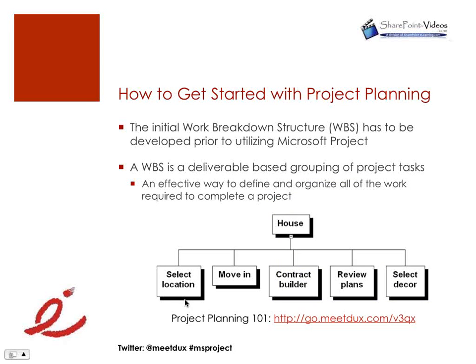After our project definition, let's say I've got this project management site up now. When we get started with planning, ideally you do your planning activities in your project environment. So you build your WBS, the work breakdown structure, and this is a picture of one. Let's say your project is to build a house, you talk about what deliverables you need to produce.